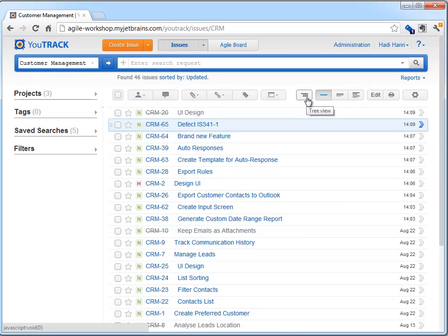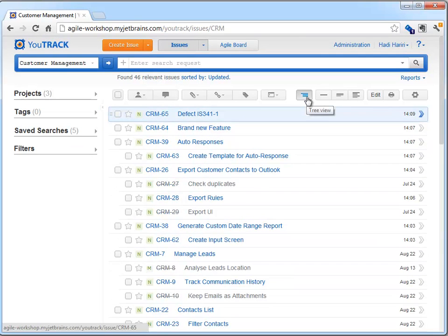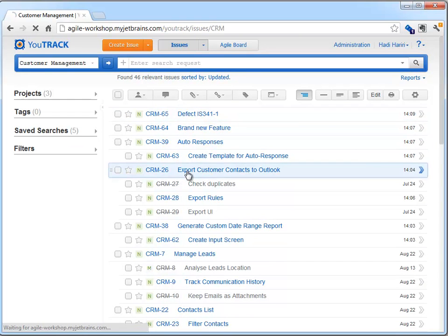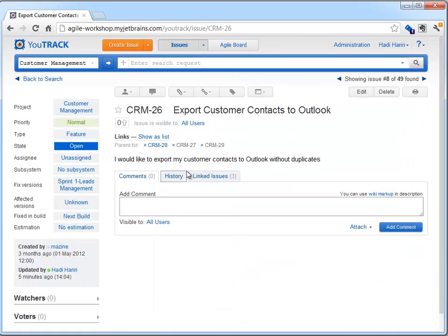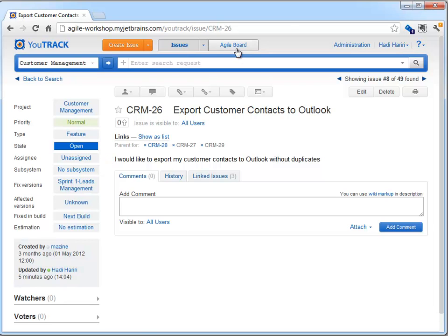Finally, switching to the issues view, we can use the tree view icon to see a hierarchical view of our issues, seeing how a feature has a series of children as subtasks. If we click on the issue, we can also see this relationship. The number of child-parent relationship is not limited, although two is normally recommended.